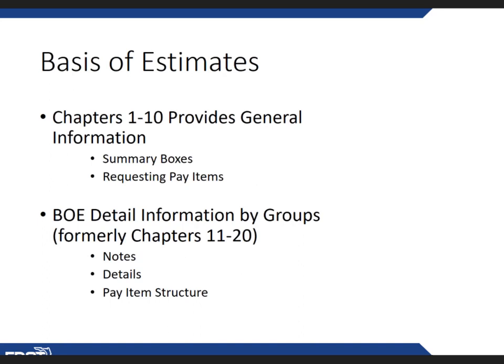The basis of estimates training is a great training as far as when to use a certain pay item. Again, the pay item is a way to tell the contractor how and what we're going to pay for, and it has to go along with the specifications. So if you're shopping for a pay item, just, oh, here's a list, this looks like it will meet my needs. However, if it's paid for in a different section of the spec book, that doesn't do us any good.